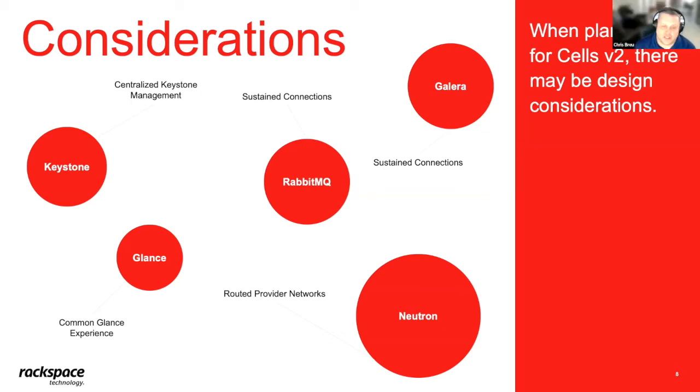Yeah, so when we started with our POC, we had only started with the 3 controller plane nodes in the MCP, right? Plus the 2 HA proxy or load balancing nodes. That worked very well with the 2 cells, 1,000 computes. There weren't any real load issues, sustainability issues, or any issues in general, really, beyond just how we deployed it. But as we started growing, we put in an artificial human gate, let's say, that every 1,000 computes we add, or every 2 cells, we pause for a tuning and review cycle. That was kind of a Rackspace-ism where we take a look at all of the components and how they're interacting with each other and see if there are ways that we can make improvements to stabilize the environment and speed it up, because API response times were a concern for the customer, but they weren't a deal breaker.